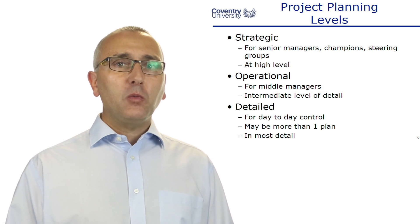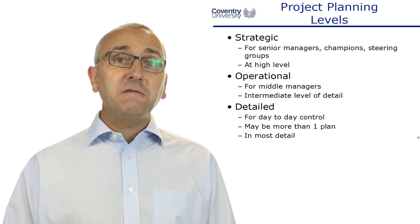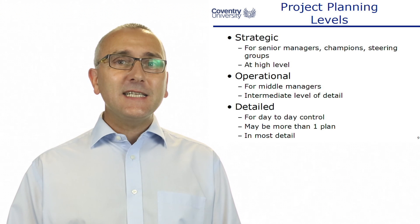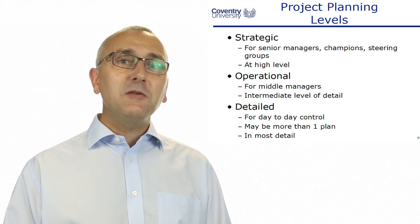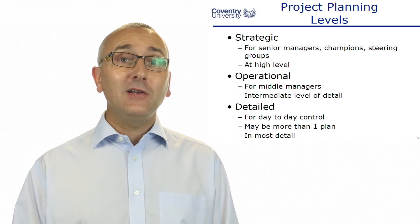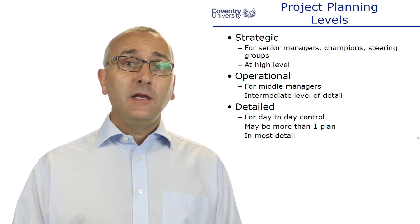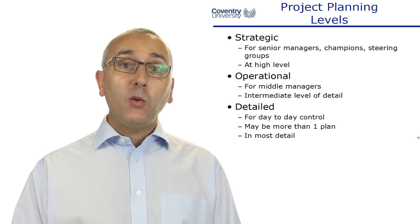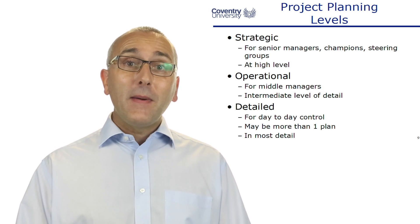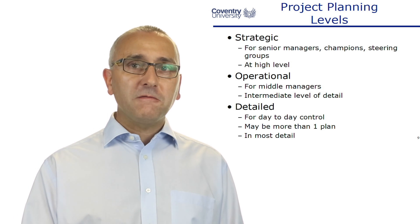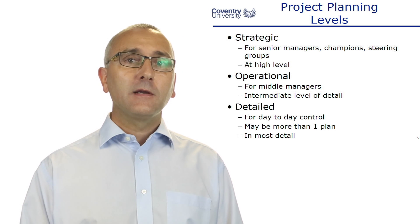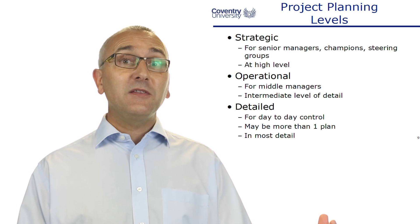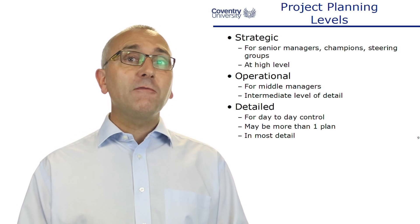There might need to be an operational plan for middle management. For example, the manufacturing department needs to know when the design is finished or when the sales and marketing process starts, but they don't need to see the detail of the sales or design plans. Middle managers need an awareness of the whole project at a middle level of detail. The detail plan is for day-to-day control of the project, and there might be more than one of these. The design department will have a detailed plan for designing the new product; the manufacturing department will have a detailed plan for clearing factory space, installing new machines, and training operators. These departments do not need to see each other's detailed plans — so there could be several versions of these detailed plans.